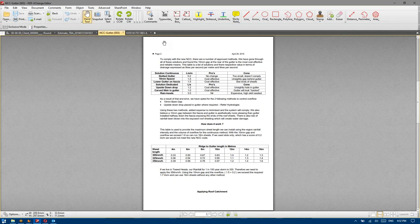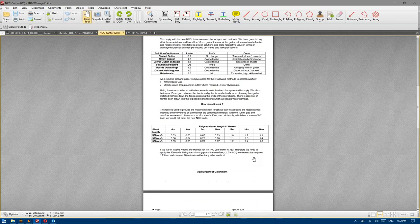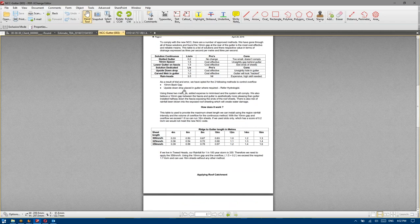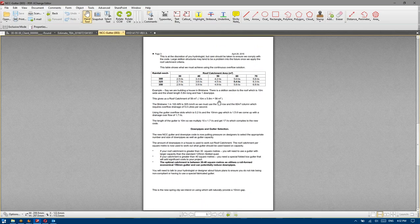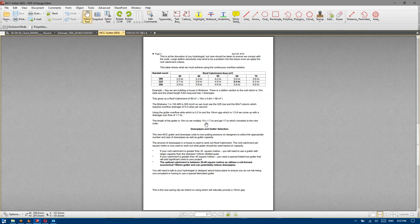If the client came to you and said I'd prefer a half-round one, they look better — suddenly we could find ourselves in a really awkward situation. But at least then a base has been established to say that these downpipes must be installed as designed. And obviously if the client or the builder deviates from that, their responsibility can't go back to the designer.